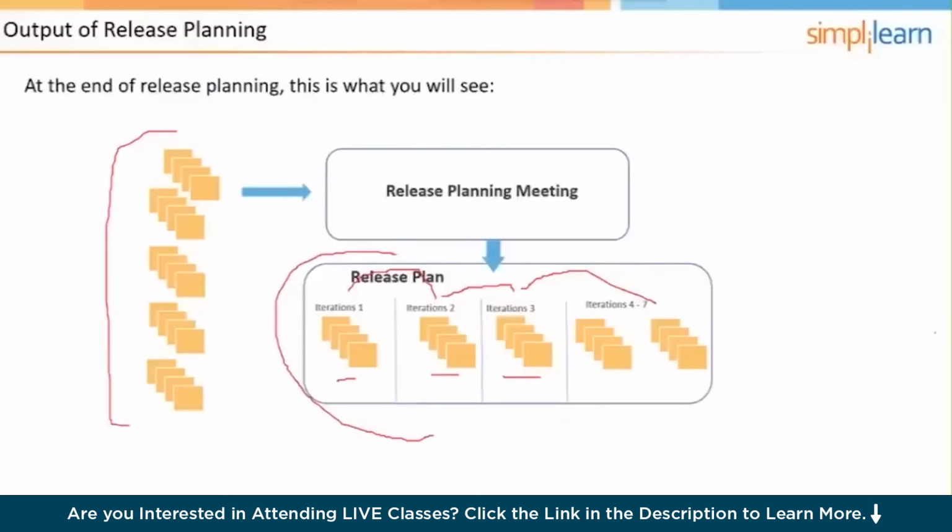It's called rolling wave planning, where we do detailed planning for things in the future in tandem with doing high-level planning for things in the future. Did I say that right? Detailed planning for things in the near term in tandem with high-level planning for things in the future. And we talked about deciding as late as possible, I believe, meaning that it's better to actually plan the later releases for purposes of making sure we have the most information available.